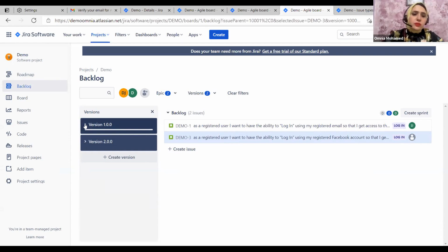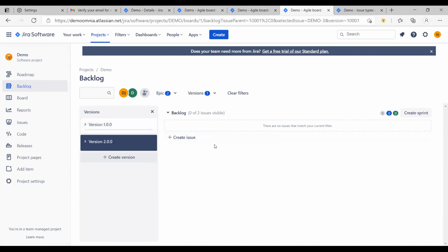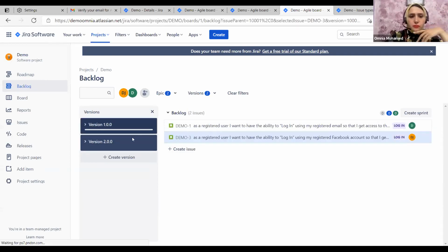It is very important for the Scrum Master and Agile Coach to make sure that the product owners link everything like that for the versions. Sometimes the backlog is not related to a version because we don't know when it will be released, so that is okay. However, when we know that this would be released in version 2 or version 3, we need to link it and keep our JIRA up to date. It would be helpful, like you said, for upper management to see.